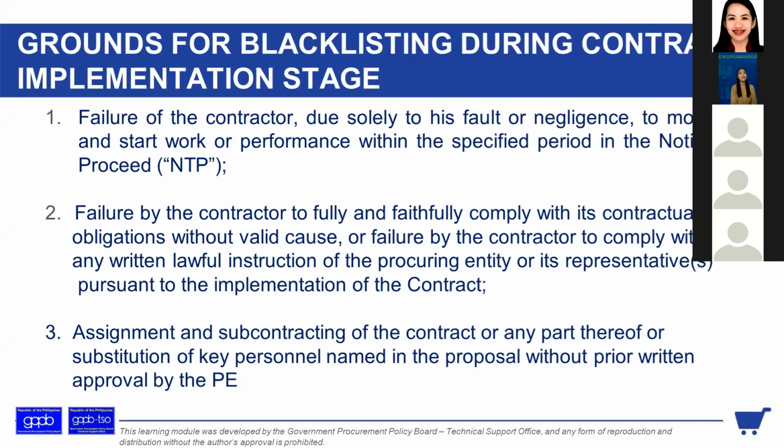Either the contractor is either it's an infra or a consultancy project. Kung any changes in the key personnel or substitution or any subcontracting on some parts of the contract is required, then prior written approval by the procuring entity is necessary. If gumagawa sila dyan ng hindi nila pinapaalam sa procuring entity, most of the procuring entity would say, we could just turn a blind eye.